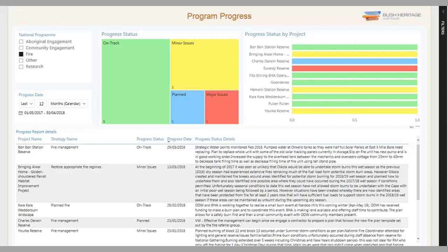Other things, we use Heritage. All our finance expenses for all our streams and activities go into Miradi. So we do have a system for our accounting with paying invoices. We're putting all our budgets for the year into Miradi. So forward-looking budgeting is being done in Miradi, but backwards-looking actuals are done in the accounting system, and we're using Power BI to bring those two worlds together.